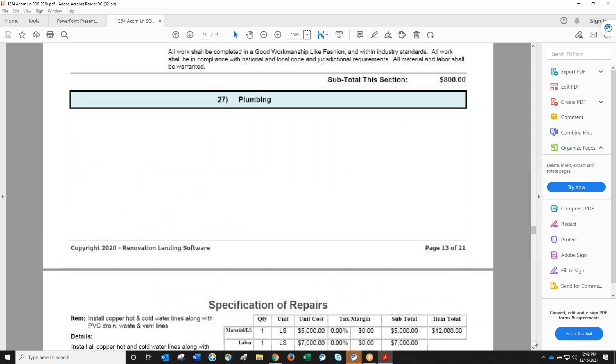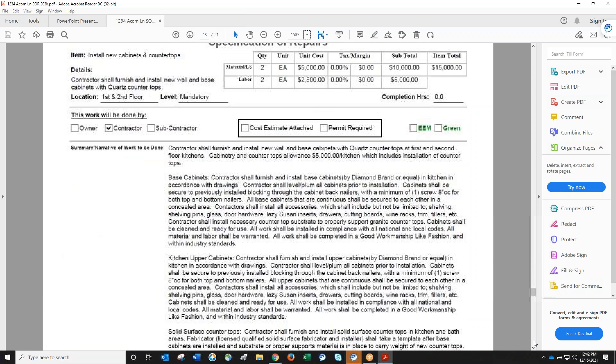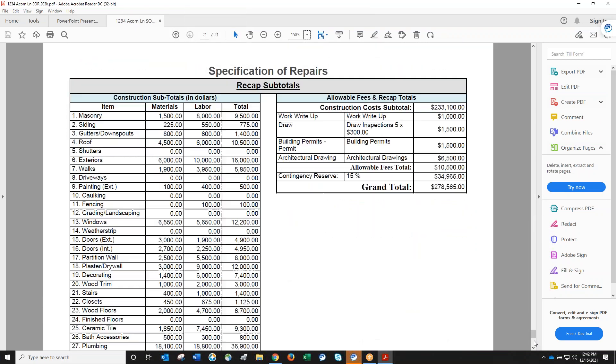This report is invaluable. You get two attachments: one called SOR, Specification of Repair, with numbers so you can see costs. Christine always goes to page 21, the recap showing construction cost total. She checks if it matches expectations and calls to discuss cutting material costs if needed. There's also a blank version for contractors to fill in their write-up so you can see if their costs are similar.